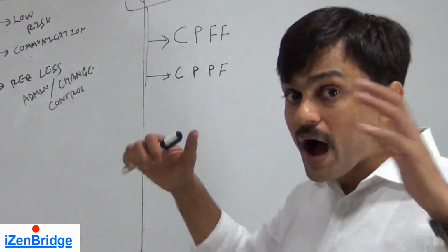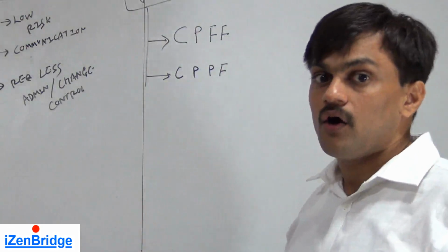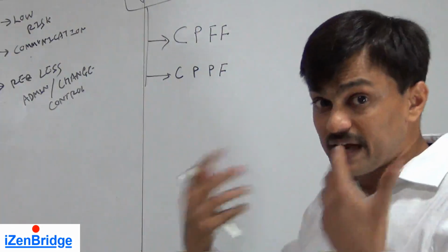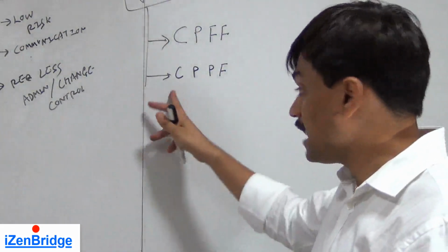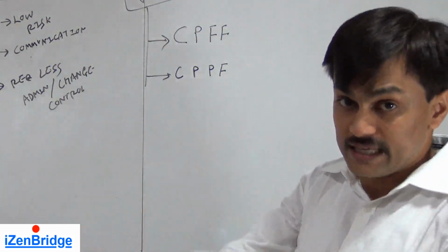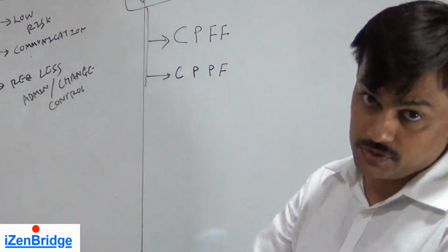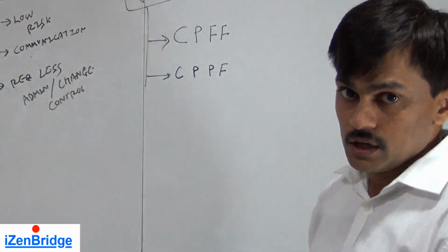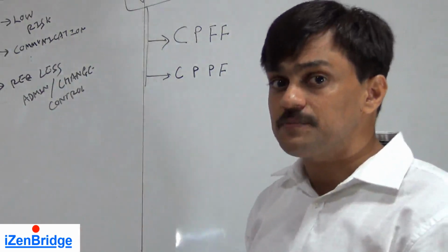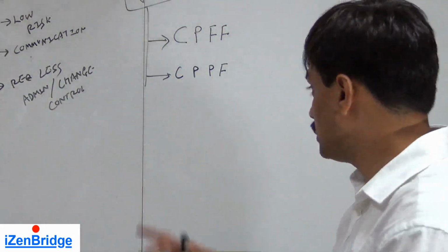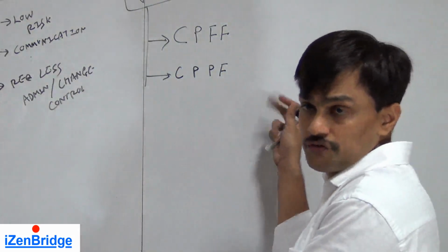In this case, whatever you spend, on a percentage of your spending, you get your fees. Means, if you buy media or campaign work, if you spend $10,000 in that campaign, you get a percentage on $10,000. If you spend $20,000, you get a percentage on $20,000. Stock or portfolio management services are usually done in the form of cost plus fixed fee.